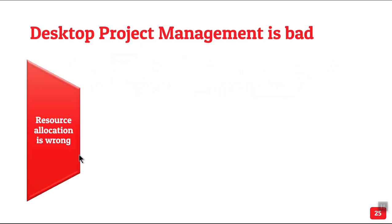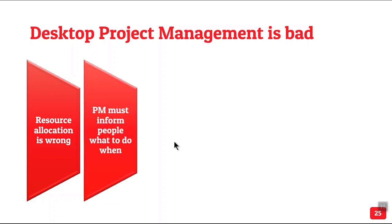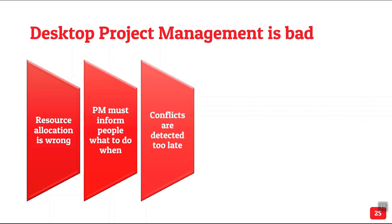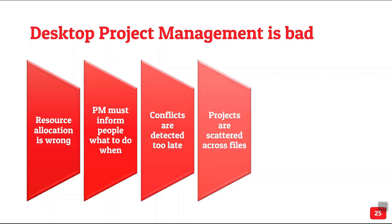The resource adaptation is wrong because the resources don't know. Now when the time comes to track the project, the PM has to copy paste tasks by group by person and mail it to them so that they know what's supposed to be done. That's not a one-time job because project schedule keeps changing. So this is a repetitive activity. If there is a conflict, I added someone three months down the line, some other project also blocked that person. That conflict will be noticed too late. Finally, if you have multiple projects, they are scattered all over the organization and some team is paid salary just to copy paste and create reports. It's a disaster.